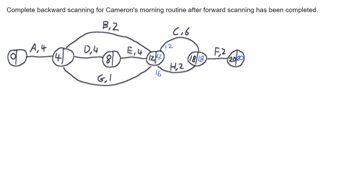Coming back through again I can now do these next paths. Starting with 12: 12 take 4 gives me 8. Then working out the other paths: 12 take 1 gives me 11, 12 take 2 is 10, and 8 take 4 is 4. I pick the smallest one again, which is 4. Then doing my last activity: 4 take 4 gives me 0, which makes sense — the latest I can start A is at the very start of the project.